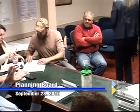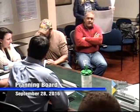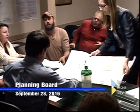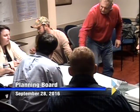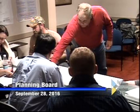So phase one is where the road comes in, the construction entrance off of Century Mill Road. And the other phase is in between where you have developed. Correct. I think they were numbered one and two. We had the choice to start in phase one or phase two because that's what the approval said, but also because these two phases have access to existing public streets.